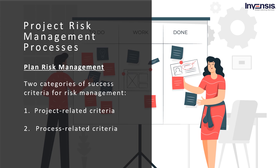The first one is called project-related criteria. To assess the success of project risk management, the stakeholders must agree on an acceptable level of results of the project-related criteria such as cost, time, and scope. To achieve this kind of consistency among stakeholders, the risk management plan must present objectives regarding the project definition documents. To guide risk management, particularly in prioritizing risk responses, stakeholders should also prioritize each project objective.